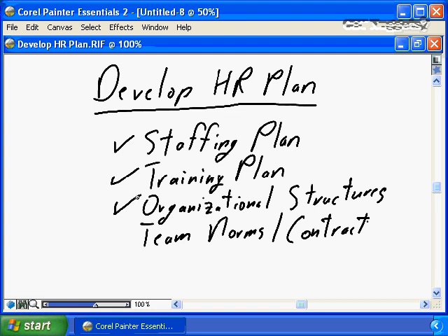You need to ensure that you have a project organization in place that recognizes span of control to make sure that the teams report to leaders who have the knowledge, the skills, and the authority to manage the team, that the teams have appropriate scope of control, that the teams work on a consolidated focused area, that the team leader has the appropriate number of resources reporting to them. Again, a norm being no more than 7 to 8 resources reporting to a leader, that you have an effective organization structure in place for your project, that the teams can work effectively.